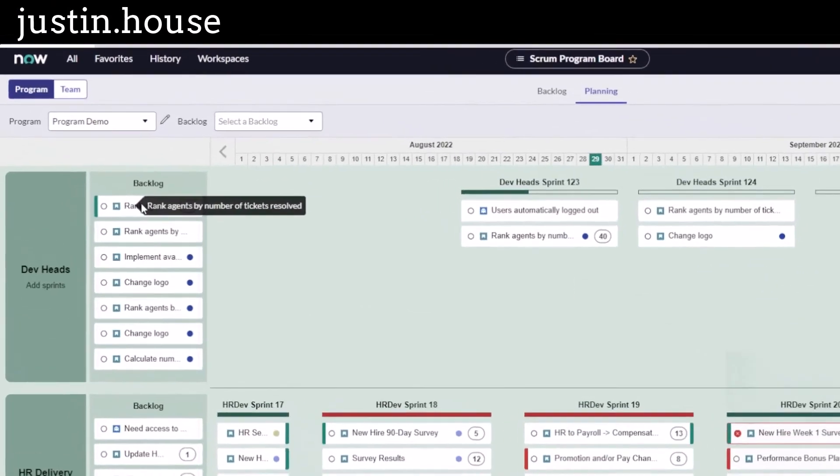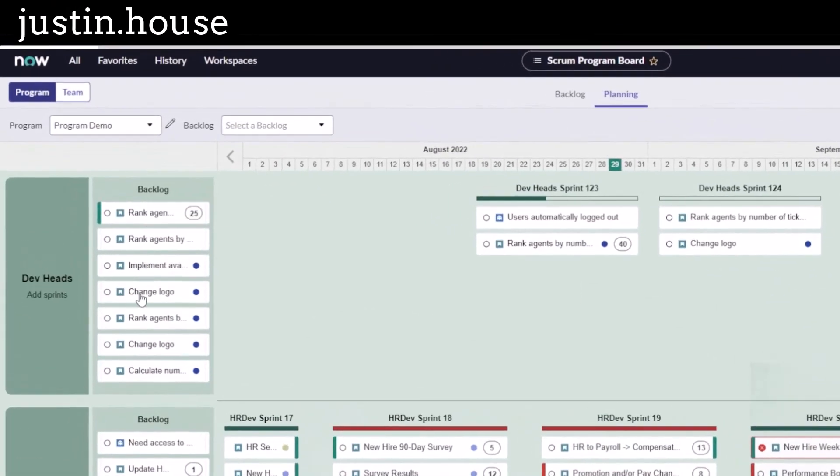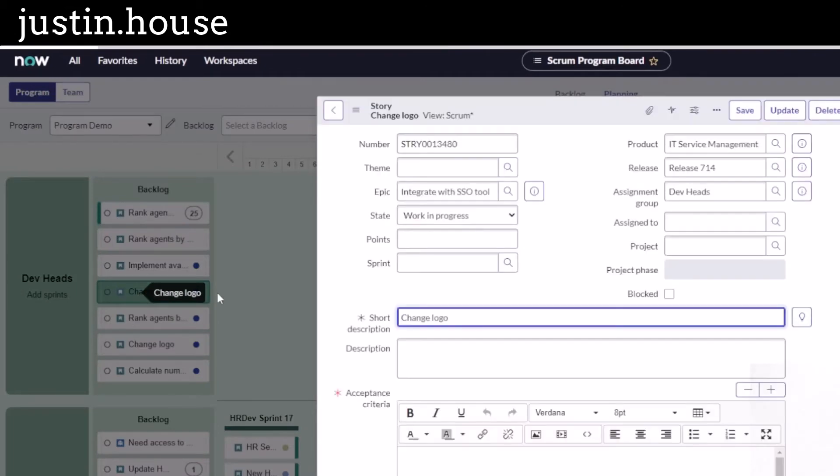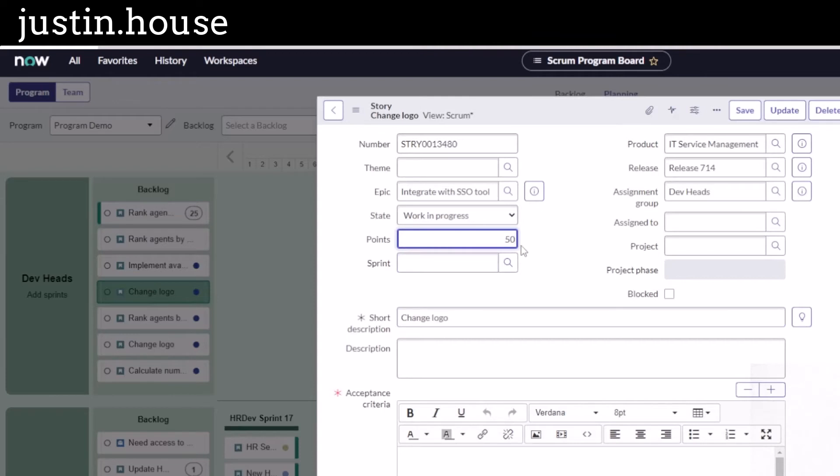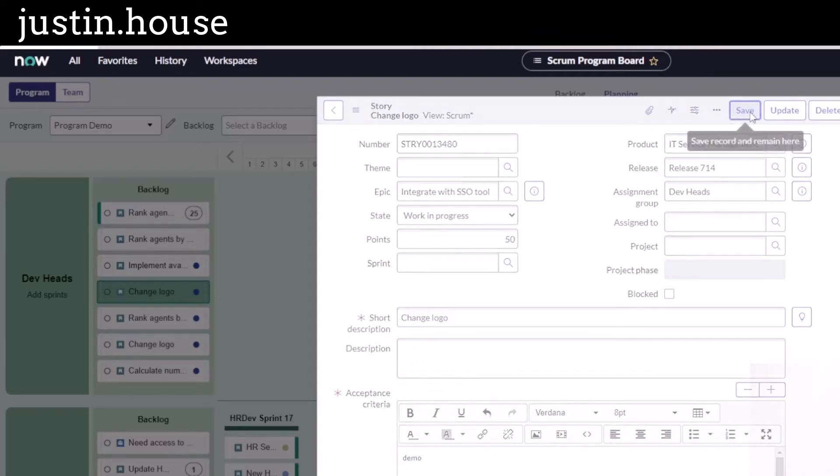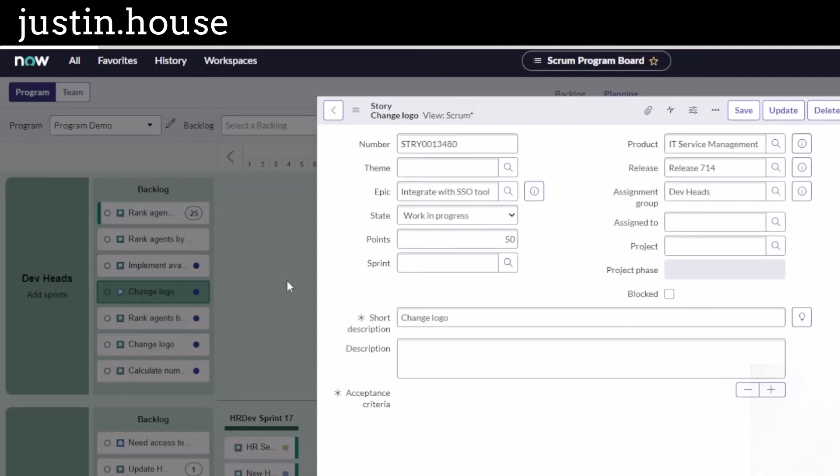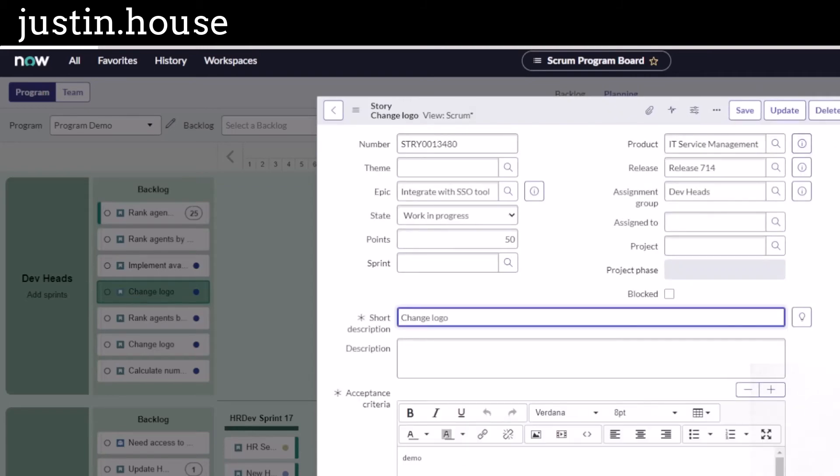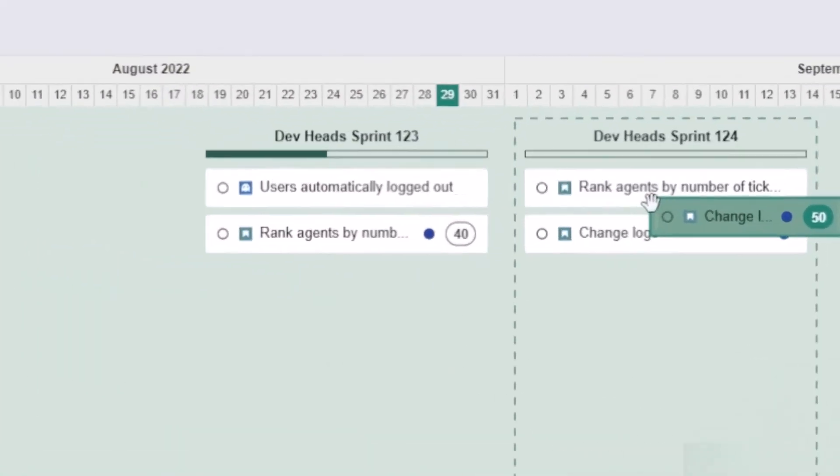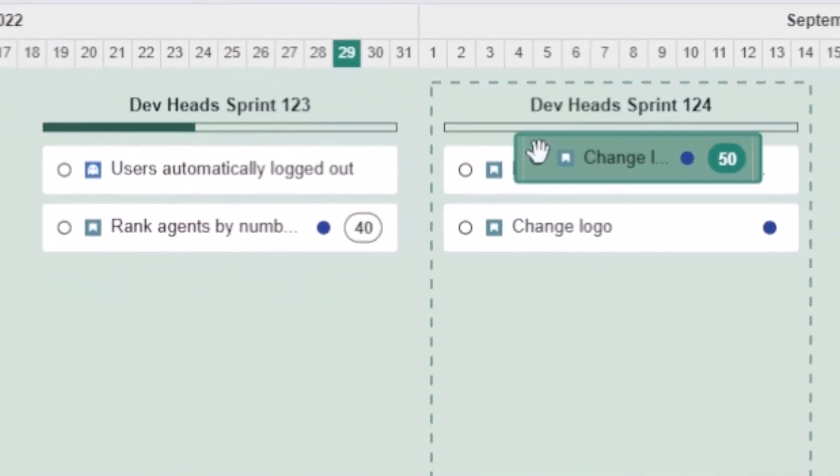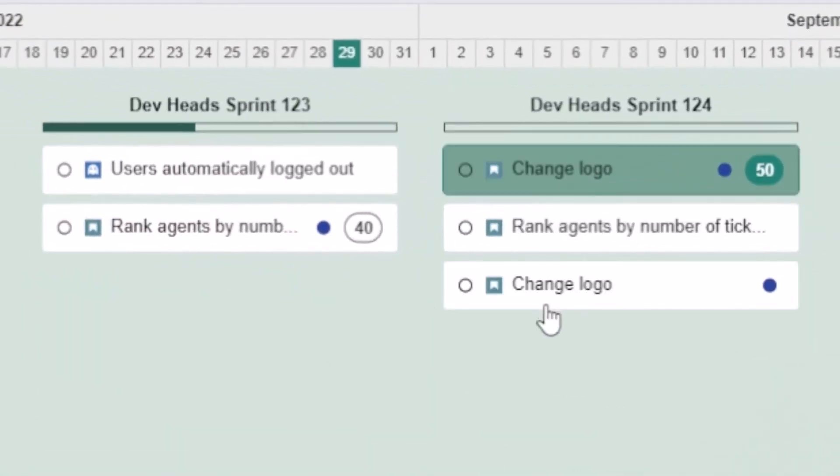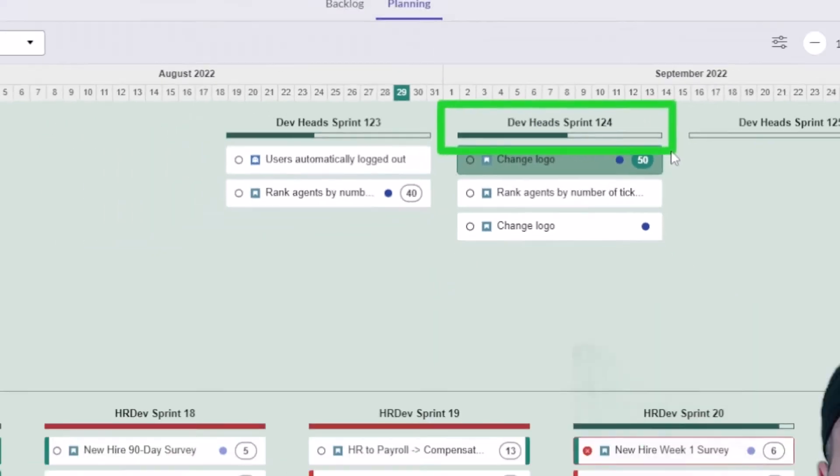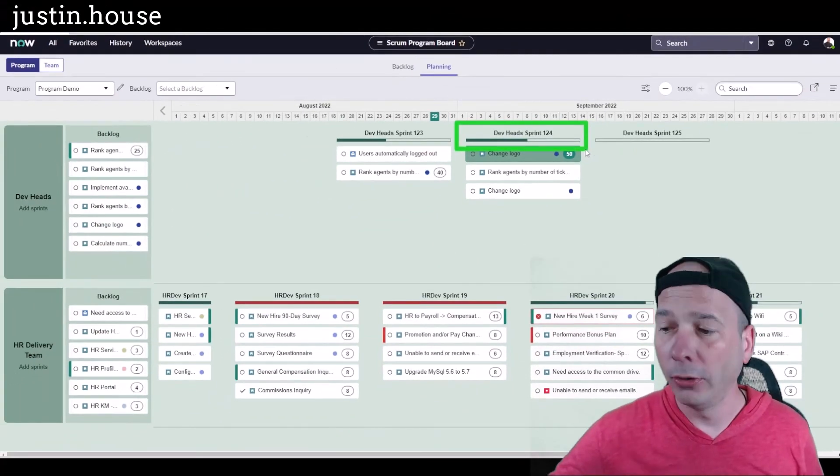If I want to populate the backlog, I can do that right from here as well. If I open up this change logo sprint, let's get some points in here so we see our progress meter actually change. We'll put 50 points on that, we'll put some acceptance criteria, hit save. And now my change logo has the right information into it, so that when I drag it into a sprint, we're going to see this dev head sprint 124 actually increase the story points or the sprint capacity for that particular one.